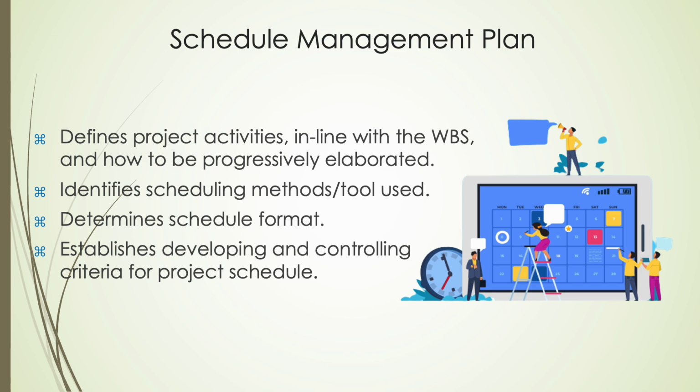These are the key components that shape the project schedule management framework, starting with the selection of the schedule model and the expected accuracy of activity duration estimates. It also establishes the units of measure, organizational procedure links with the WBS, and the control thresholds needed to monitor schedule performance effectively. In addition, it outlines the rules for performance measurement, specifies the reporting formats, and describes the documentation process for all schedule management activities. Together, these guidelines ensure consistency, precision, and transparency in managing the project schedule from start to finish.